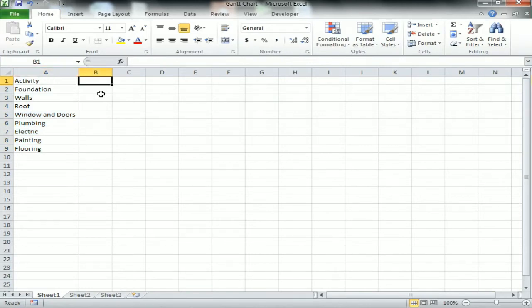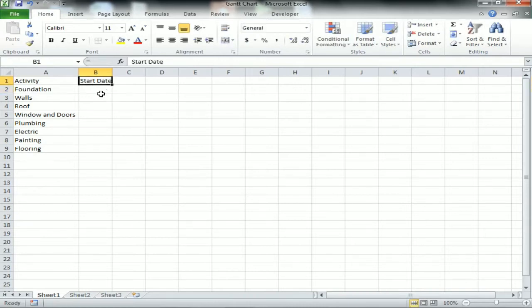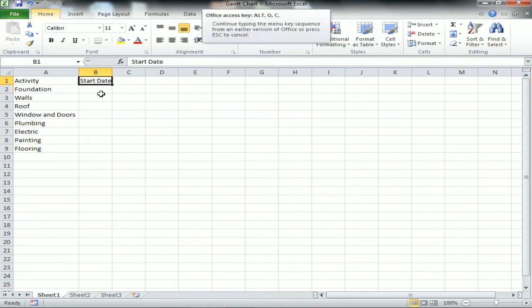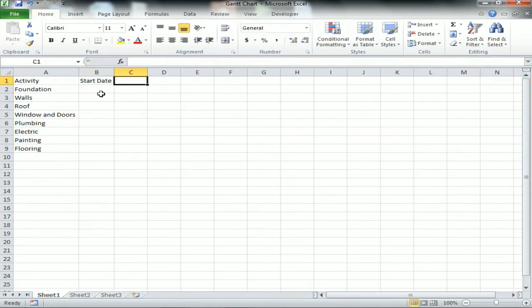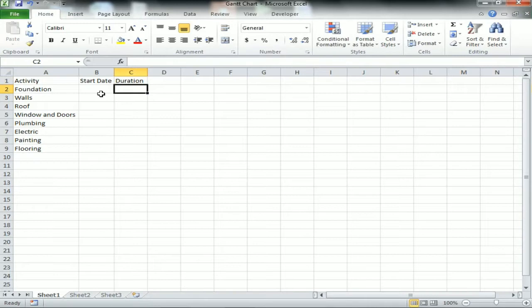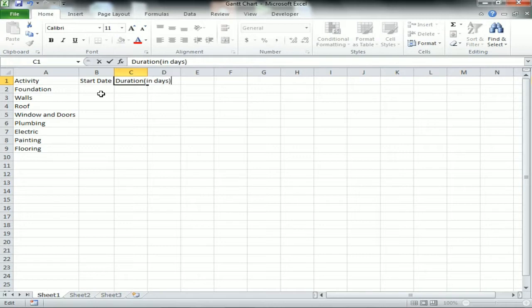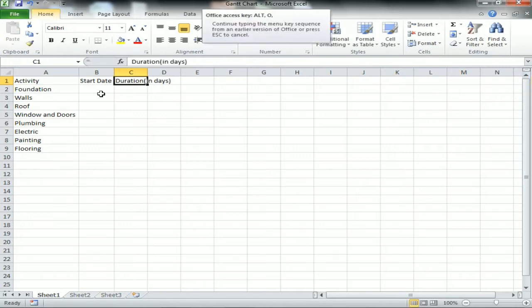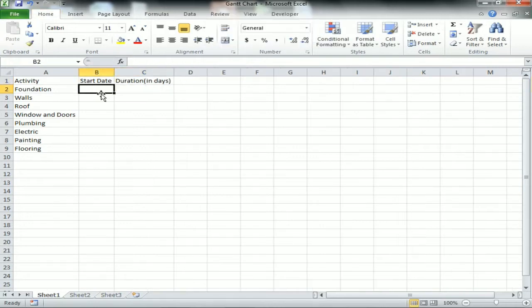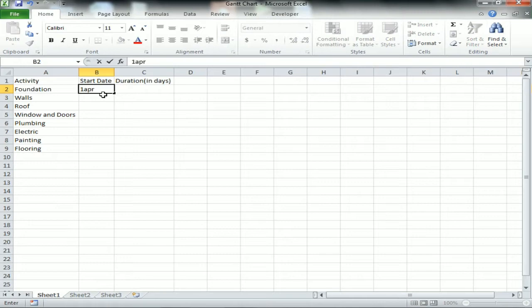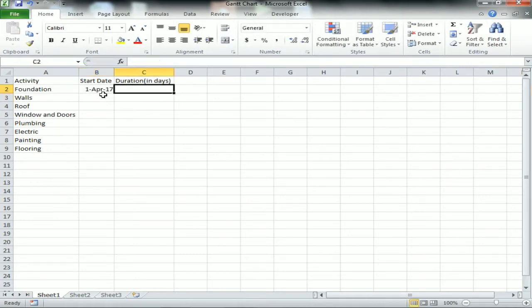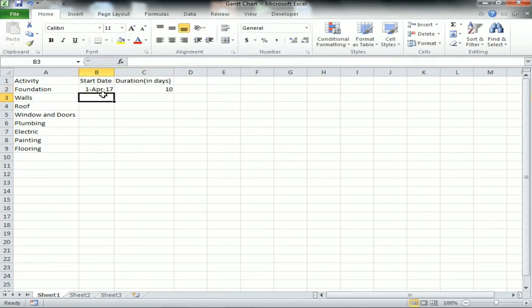Now I'm defining the date, the start date. These are the activities which have to be completed. I'm taking the start date for each activity, and I will also take the duration in days - how many days each activity will take. Let's say my Foundation is getting started from first April and it will take 10 days.